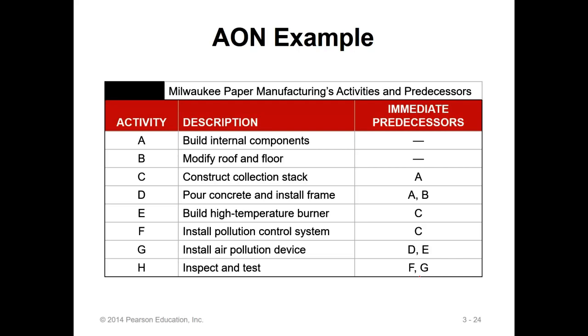And see, we have the relationship of the prerequisite. You see, A and B, they can both start. They have no prerequisite. Okay, there's no sequence. But C cannot be started until A is finished. A is the prerequisite of C. However, D has two prerequisites, A and B.